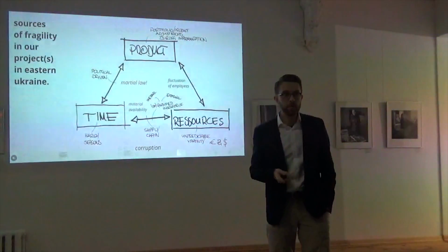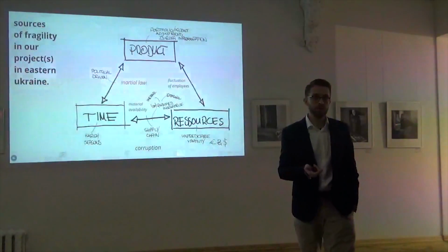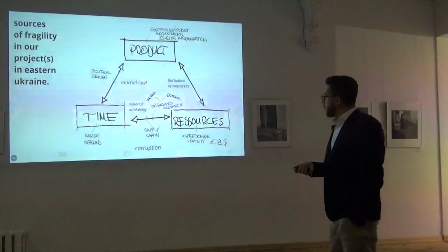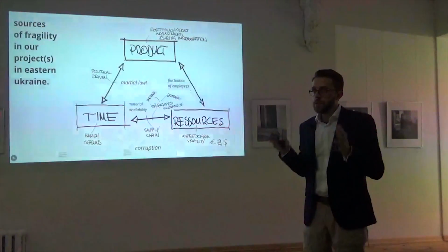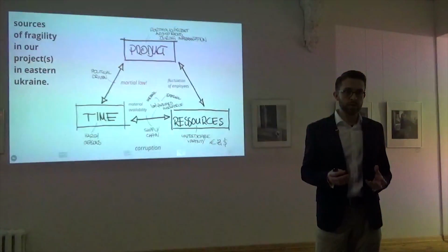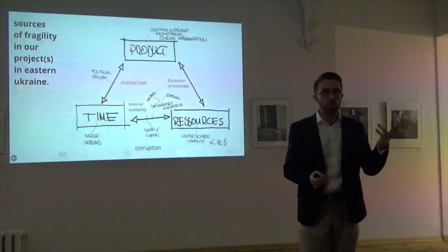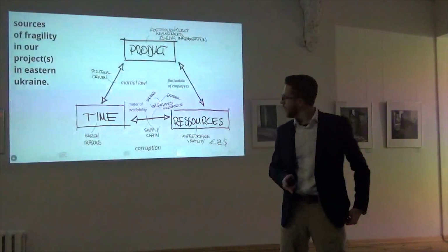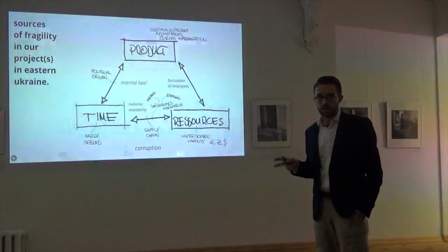Yeah, well, I have never seen a winter like in Ukraine, never before. I lived like 25 years in Germany. I've never seen so much snow like in my first week in Ukraine. And with this, for example, in Germany there is no reason to stop construction works during the winter time. It's like maybe 1 week where you can't do some concrete work, but that's it. Here, it really stops for months, and that's a huge problem.